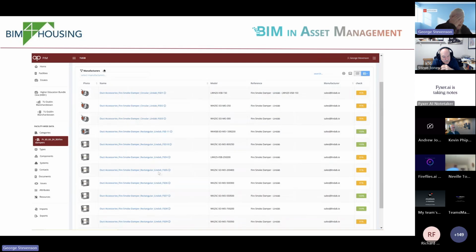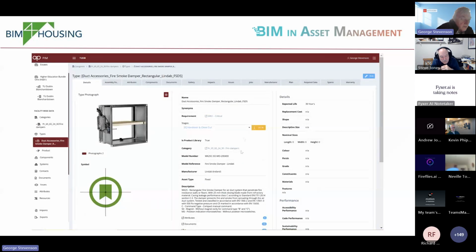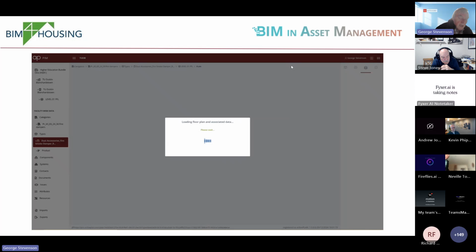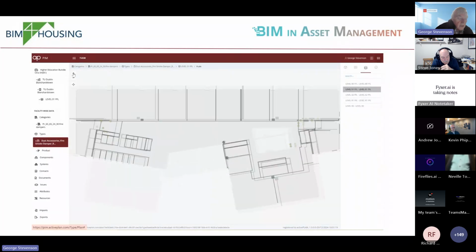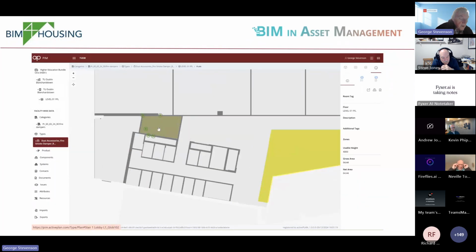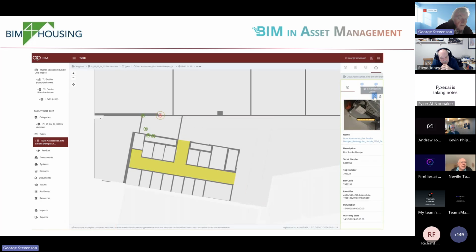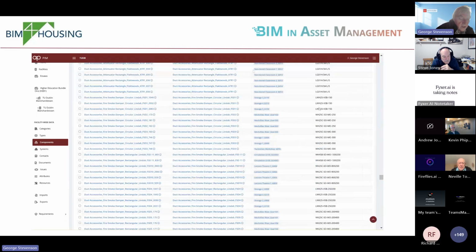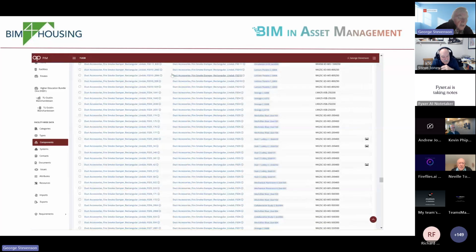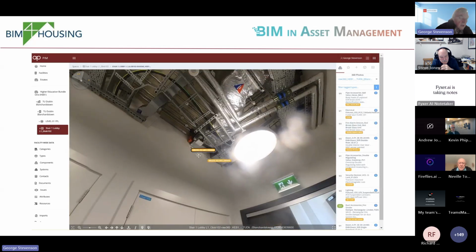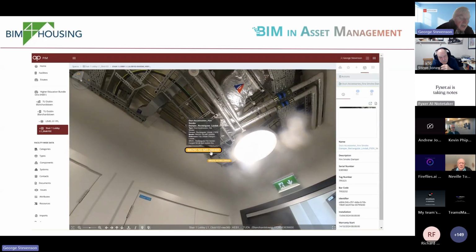So what we've got here are, for example, finding fire dampers, being able then to tie this back to the product information. So we've got the golden thread relationship between the need for a fire damper, what product was selected, where has it been installed, and then we're also tapping into other information that was collected using Open Space by the construction team, which are 360 photographs that then the asset teams can use, which is a fantastic way of tying all these things together.